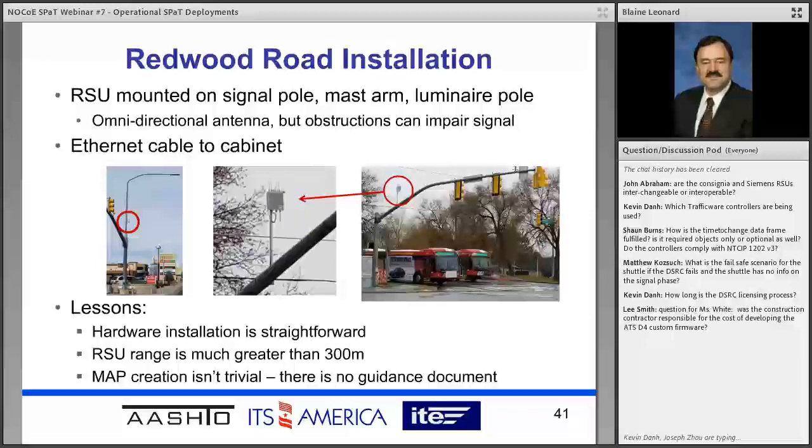We also don't have a lot of huge trees, a lot of growth along the corridor, and so whereas some cities find they need to put these DSRCs way out on the mast arm near the center of the roadway, if you will, we have not had to do that. That's simplified our installation, allowed us to install without closing lanes, for instance. And so these pictures show you a couple of those installations and how we've done that.